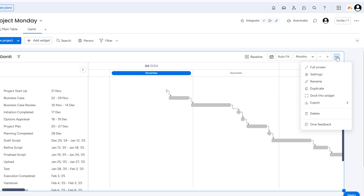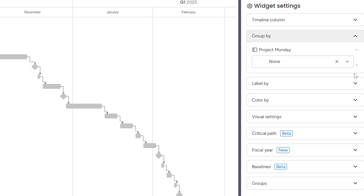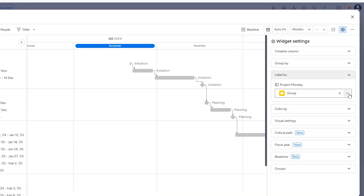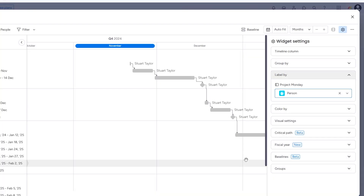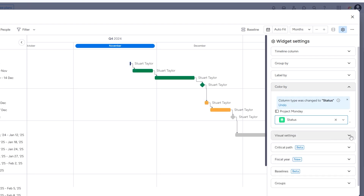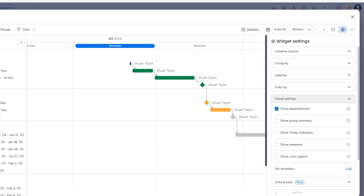Now for the fun part: customization. Click on the three dots at the top right corner of the Gantt chart and select settings. If you want to see the tasks grouped by their stages, select 'group by' and choose group. You can add labels to your Gantt chart here too — I like to select owner, just so I can see how everything depends on me. You can change the colour by section to status so you can see your task status on here too. And you can toggle on dependencies and the today indicator in the visual settings.